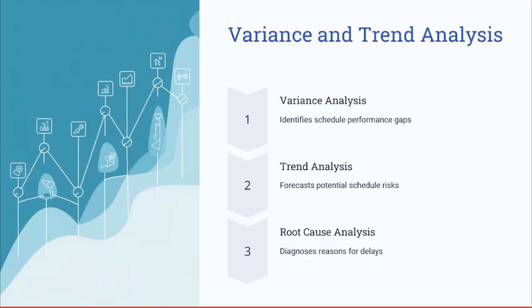Later, a root cause analysis revealed that insufficient test engineers caused the bottlenecks. These bottlenecks were caused by the growing backlog of testing tasks that were not moving. Then the root cause was identified as insufficient test engineers, and the project team reallocated additional testers, improving the SPI to 1.02 or 1.03. So this is how you can utilize these techniques to resolve schedule performance issues.